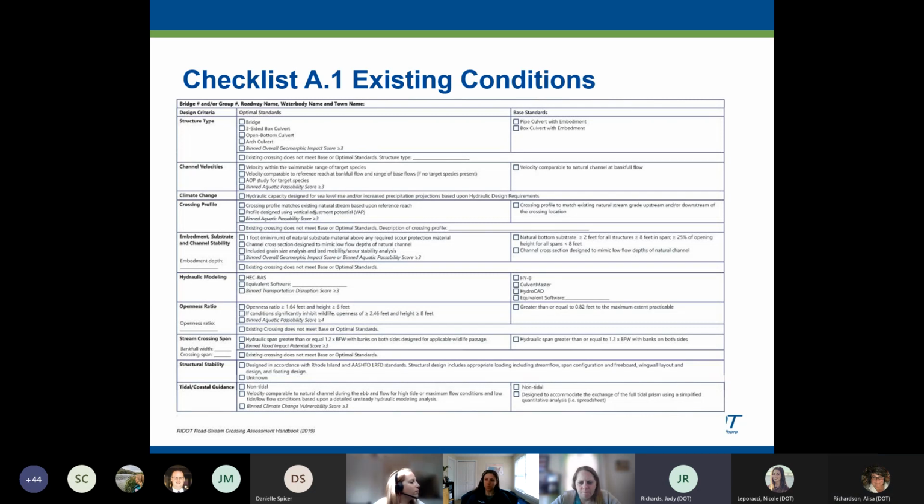And I guess my view is if we identify it in scoping, then that's when we can get a construction engineer's estimate. So we know, all right, we may need more money in the TIP because now we have some understanding that we may need to adapt this for climate change, let's say. So what I'm trying to do, Jody, is look at the projects that are coming up before they get to scoping, and see if the money needs to get added to the TIP even way ahead, not when it's too late within that fiscal year.